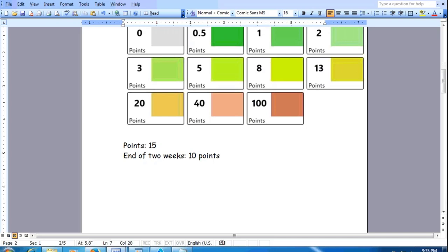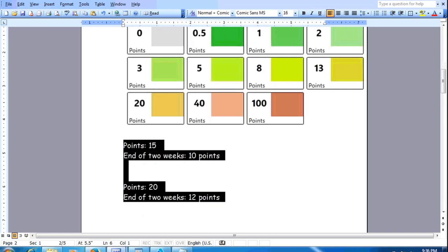Same thing in sprint two. Again you estimated, you were a little bit aggressive, and you came up with, okay, we are going to accomplish 20 points in the next 2 weeks. But again, at the end of 2 weeks, what you accomplished was just roughly around 12 points. That means 8 points will carry forward to sprint three. So if you look at it this way, what do you understand? What is your team capacity? What is your team velocity? What do these numbers really indicate?